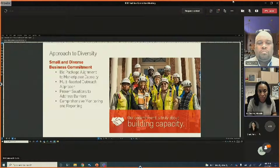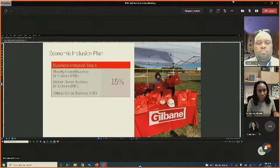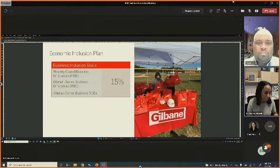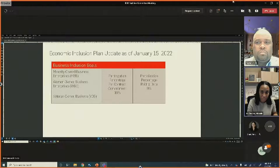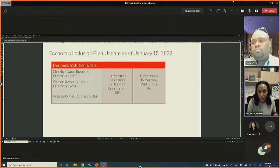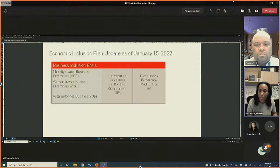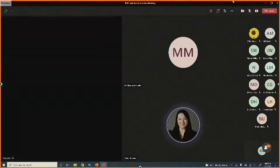By addressing barriers that keep small businesses from doing work, a successful model is being created. The economic inclusion goal for this project is 15%; at contract time there was a 10% commitment; paid to date as of January 15th is at 9%. Pending payment applications are being closed out and participation numbers will be updated accordingly.